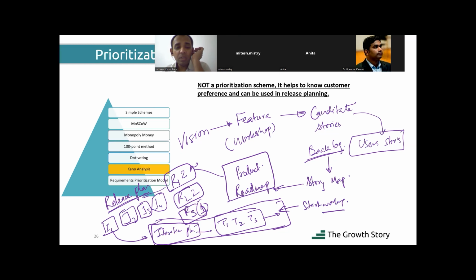So this release plan will be done by the product owner or Scrum Master? Product owner. Everything is product owner, in collaboration with the team. Okay, so basically the Q1, Q2, Q3 in which I'm going to release it, I'm working the reverse way of the execution, where sprint planning will come. First, I have to give the releases like a series. You have a 1 year series, so you have to distribute it into a number of quarters. Yes, if you have quarterly releases, then yes, for four quarters you need to divide the entire work. Okay. Thank you.